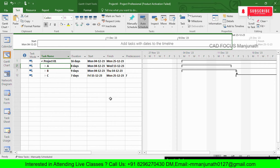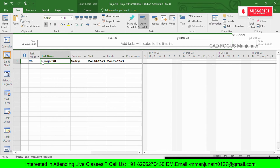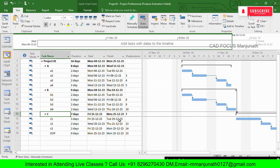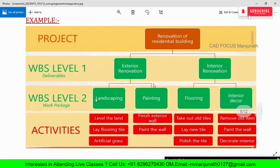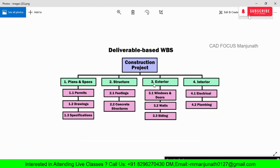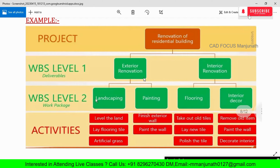Now that we understand the basics, let's look at a real project. We have a 'Renovation of Residential Building' project — the same project also explained in Primavera. The WBS Level 1 includes 'Exterior Renovation' and 'Interior Renovation.' WBS Level 2 includes Landscaping, Painting, Flooring, and Interior Decor, with individual activities beneath each.